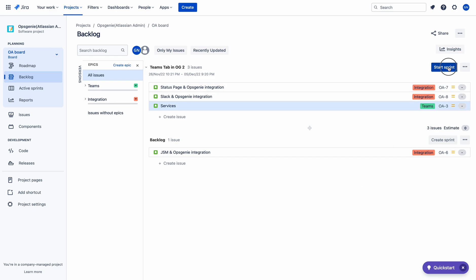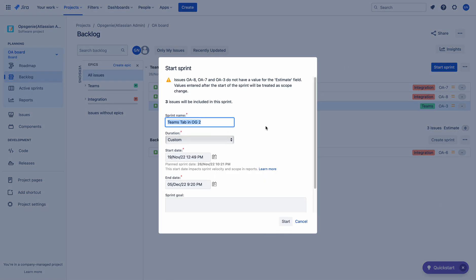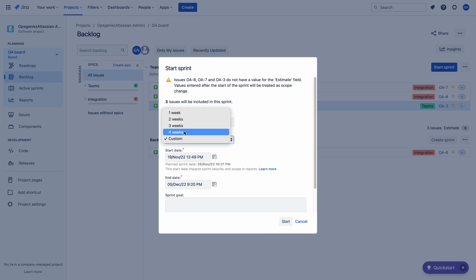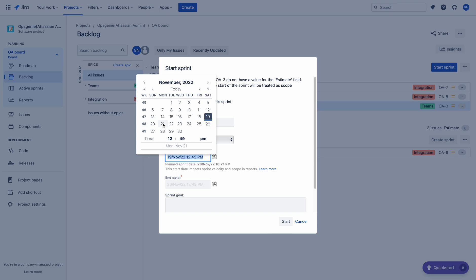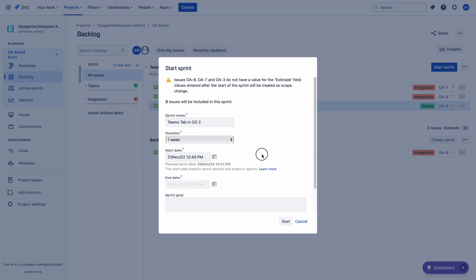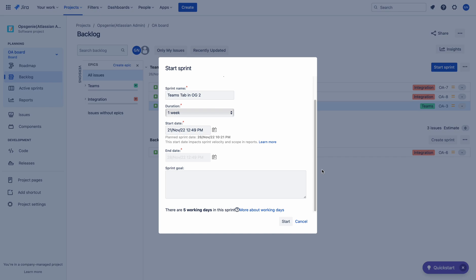Let me start the sprint for the coming week. I usually choose a one week duration. I will create two videos in a week — that's comfortable for me. The start date is coming Monday, the 21st of November. The end date is automatically set by Jira. Let me start this sprint.